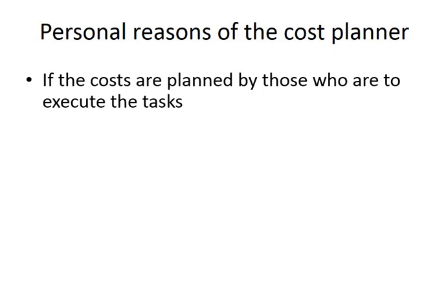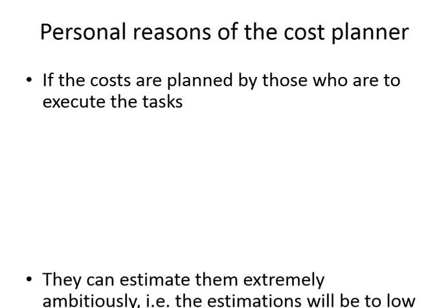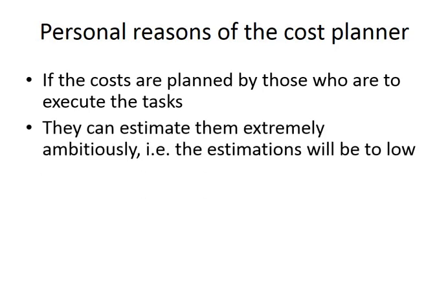If the people planning are to execute the task, and as I have told you, this is what we often do when we want to plan the cost, I mean to talk to the future task managers, they can, in some cases, estimate the costs in an ambitious way.